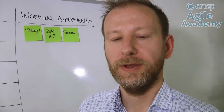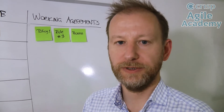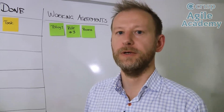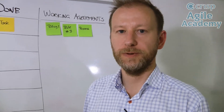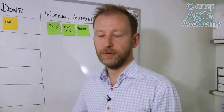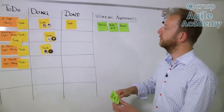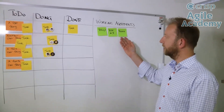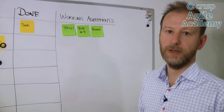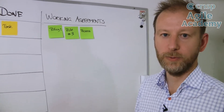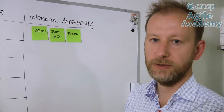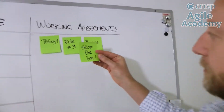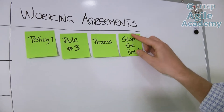So how do you start? As with every decision, everybody on the team needs to be on board, so I recommend using a consensus vote. Somewhere along on your scrum board, you normally have working agreements put up, and adopting stopping the line is another working agreement. So if you get consensus on doing this, put up a new working agreement that says stop the line.